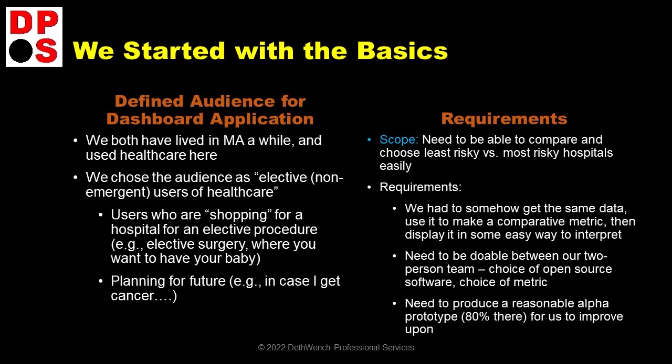Next, on the right side of the slide, we set up the scope and requirements. We agreed that we might not be able to tell which hospitals are objectively safe or risky, but we could tell, relative to each other, which ones were the least risky and which ones were the most risky. We decided that this was the scope — to be able to make those comparisons easily — and we set up a few requirements. Then, after we established these basics, we decided what roles we'd both play on the development team, and we went on to develop our solution.